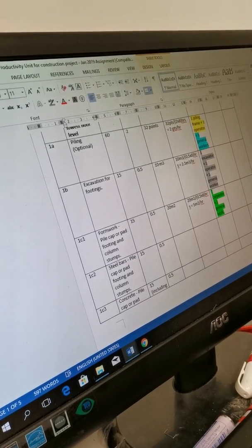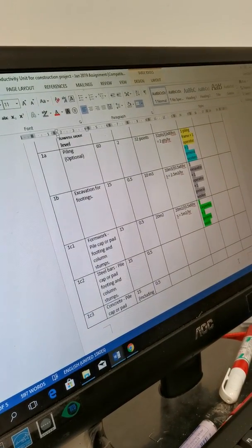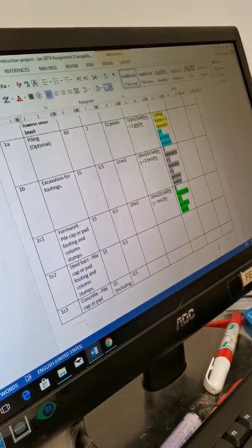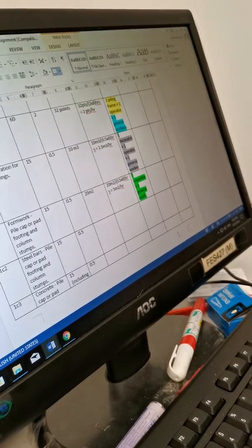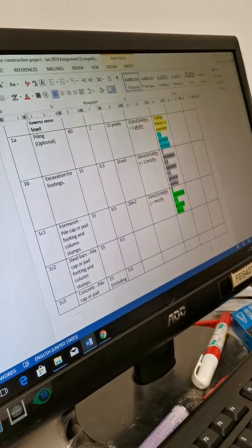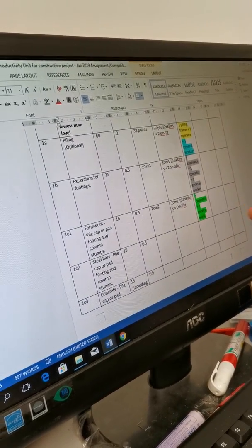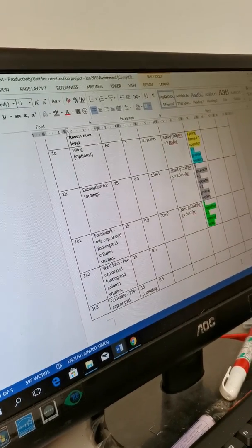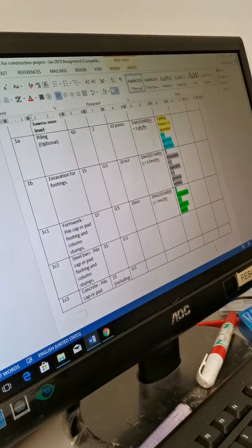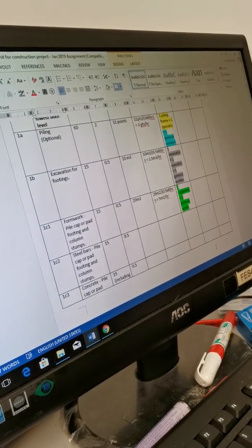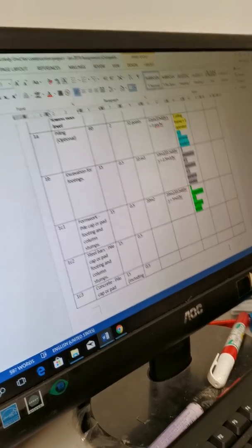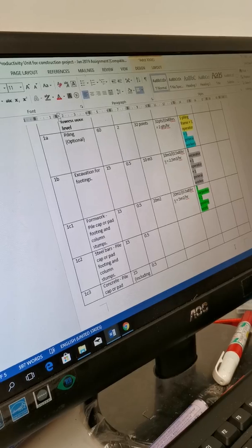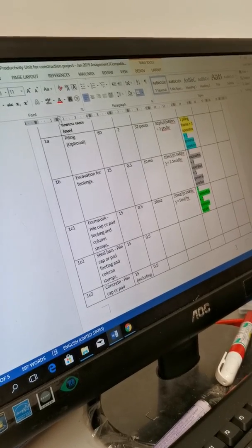You need the group effect to size up your temporary structures and your project facilities and all this kind of thing. A hundred general labor, you set up a canteen for a hundred general labor. Okay, you need to size up. You cannot, if only 3 people working here, then no need canteen lah. I mean, for example. So the labor sizing for your whole project goes in your layout only. This one is only for sizing up the layout. So you call them, hey, how many people, they will let you know. Or if not, you just put a reasonable figure then.